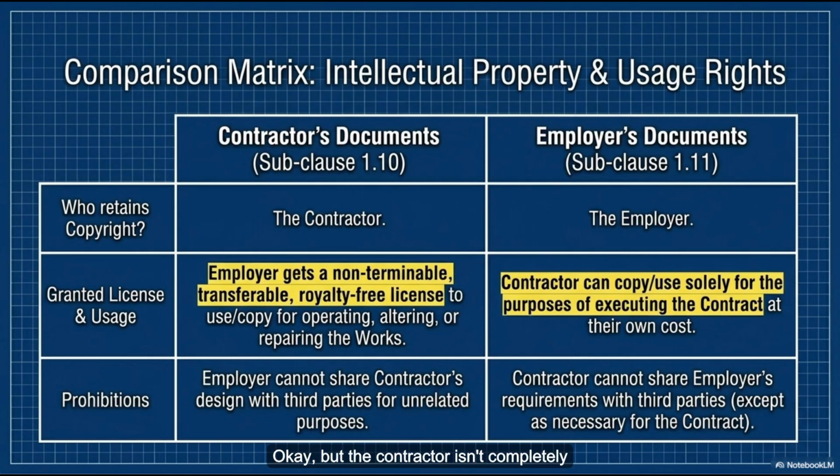Okay, but the contractor isn't completely at the mercy of the employer's original, possibly flawed vision, right? I found this really brilliant mechanism in Clause 1 regarding finding errors. Yes, the scrutiny clause. Right. When the contractor finally gets onto the site and begins heavily scrutinizing the employer's requirements, if they spot a major defect, say, the concrete specifications are just totally insufficient for the soil type, they have an obligation to speak up. They absolutely do. They must give notice to the engineer within 42 days of the commencement date.